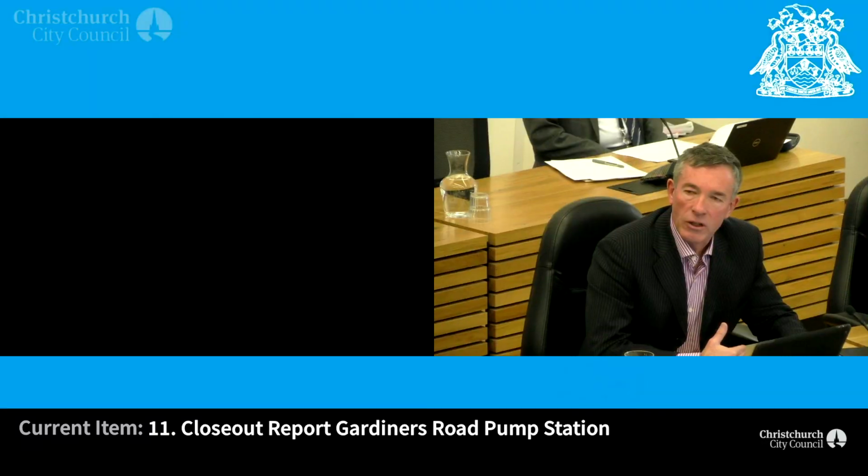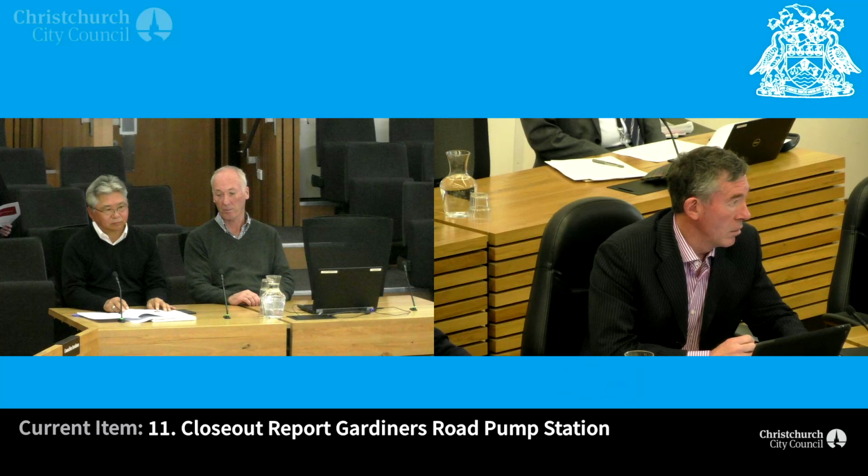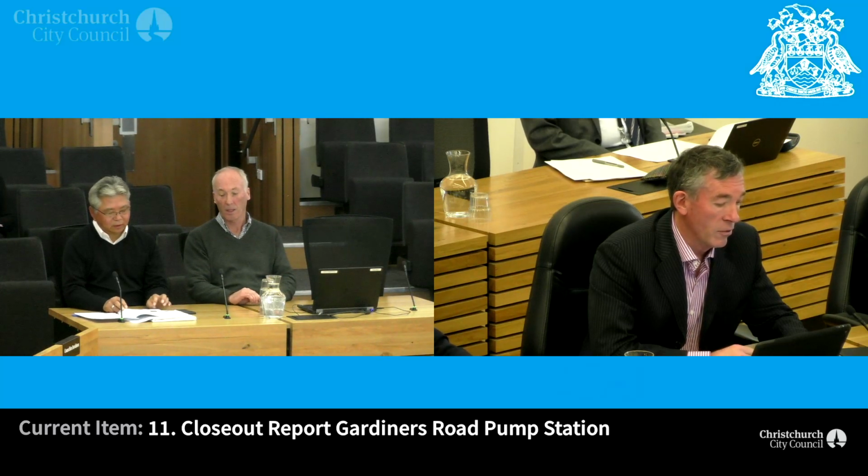Tim? Thank you. You can understand our concern because it's a 25% increase through variations. So what satisfaction can we have with regards to moving forward with other stations and other projects? Is it 25 or 13? The variations are 515. The tender award was just under 4 million, so it's gone from just under 4 million to just under 4.5 million.